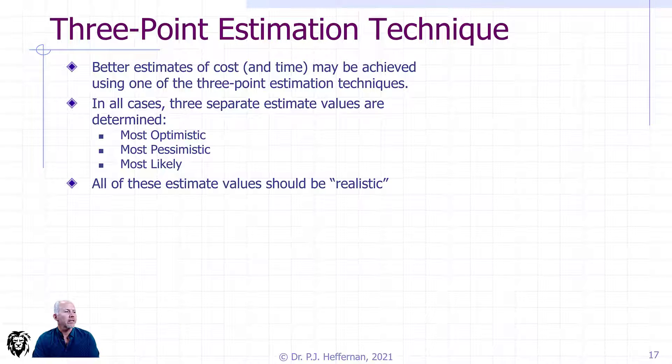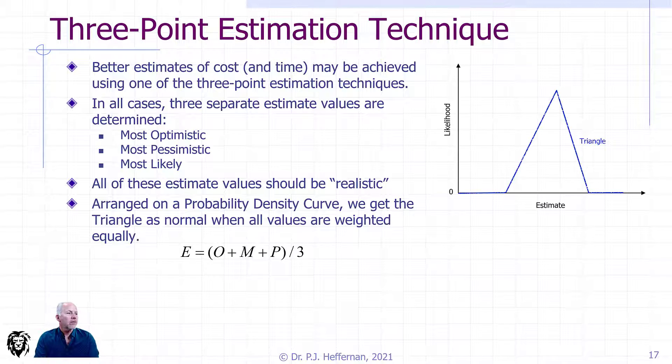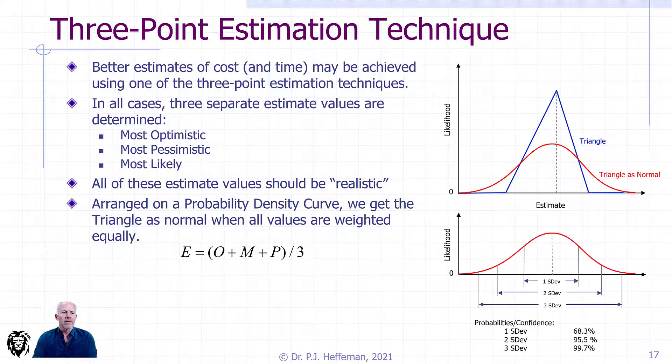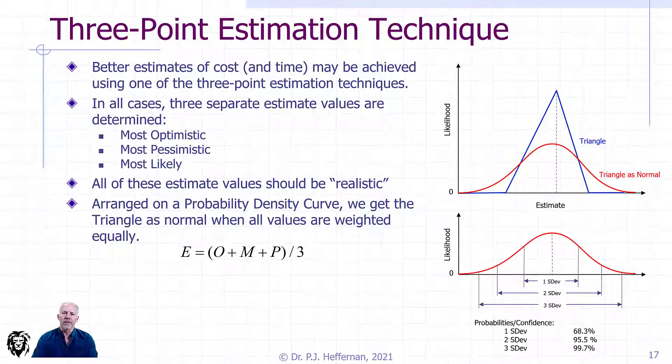All of these estimate values should be realistic. The typical three-point triangle as normal method has our optimistic, pessimistic, and most likely, and they're all weighted exactly the same. It can be estimated as a triangle as normal. I don't see that as often where we're going to go into deep probabilities. If we're going to need that kind of fidelity, we're probably going to go with this next technique, which is the PERT technique.